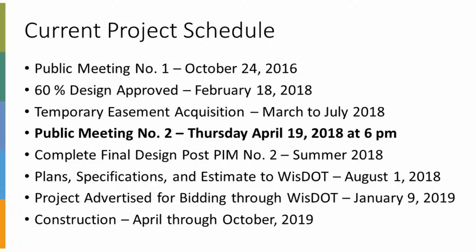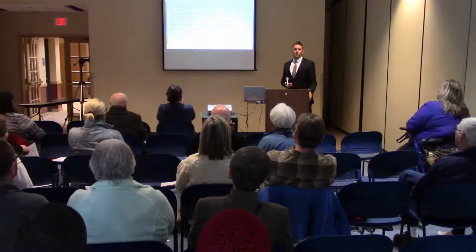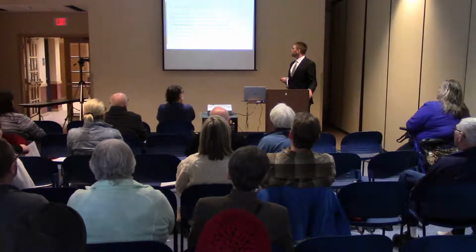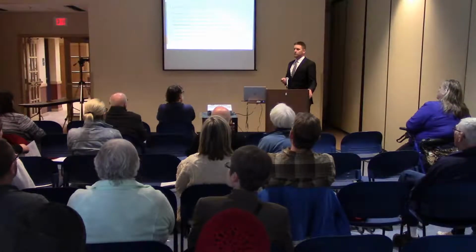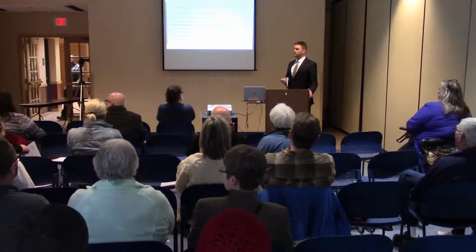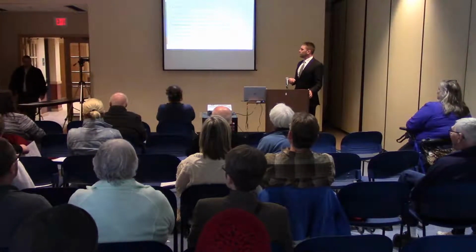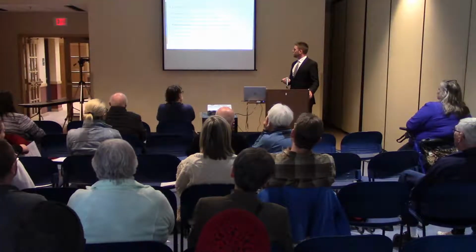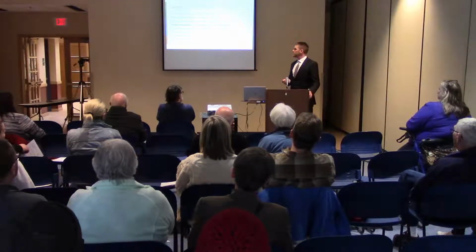The current project schedule: we had the first public information meeting back in 2016. Our 60% design package was approved February 18th of this year. Temporary easement acquisition is ongoing. That's why many of you are here tonight, and the gentlemen in the back of the room are here. That's anticipated to be completed by July. And tonight, public information meeting number 2, April 19th, 2018. After the meeting tonight, we'll be working towards our final design package, which is due for PS&E, plans, specifications and estimate, August 1st this year. The project will be advertised for bidding through WSDOT January 9th of 2019, and then construction is anticipated April through October of 2019.